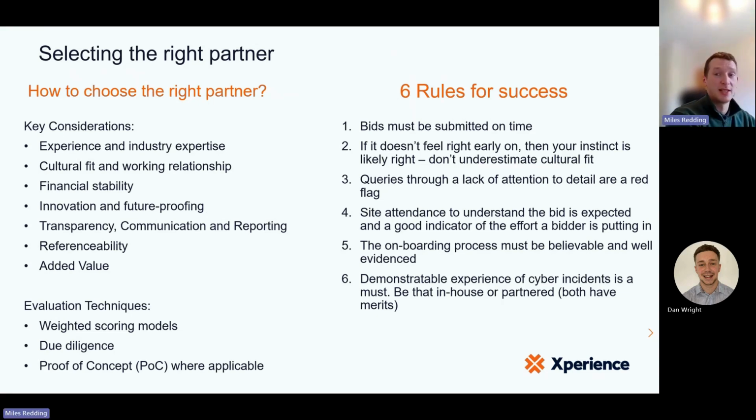The onboarding process is a key part. I actually see too many tenders not even ask for that onboarding process. I would recommend that you ask bidders to outline how they would onboard and transition those services. But it must be believable, well evidenced and documented. And once again, you can reinforce that with reference checks to speak to clients that have been through similar onboardings previously.